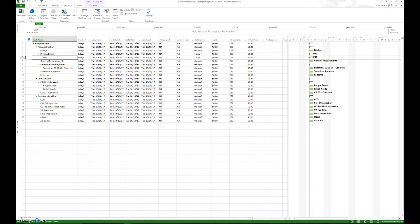20 days is a long time. That's one month, usually much longer than we want. So two to 12 days is a good rule of thumb.